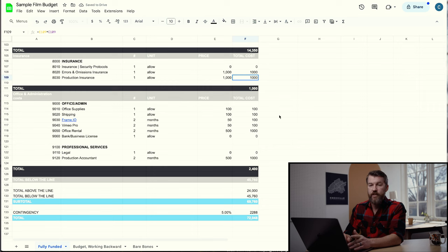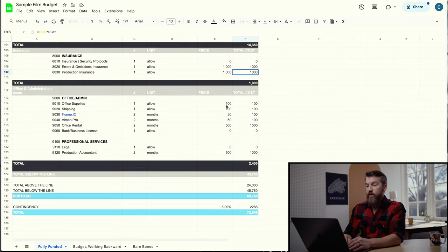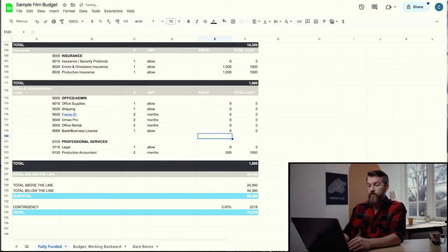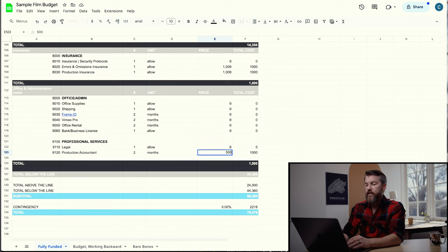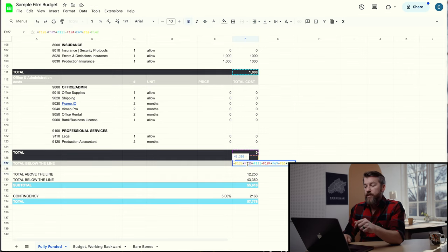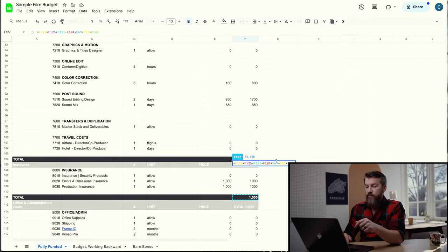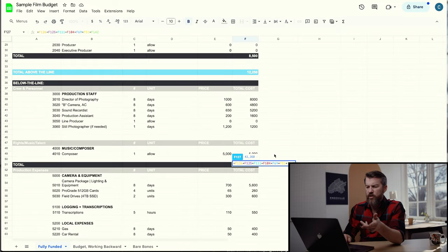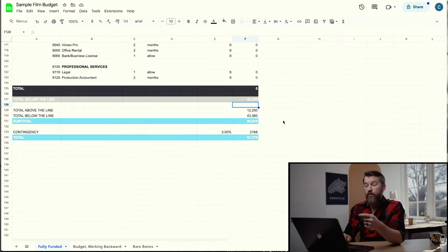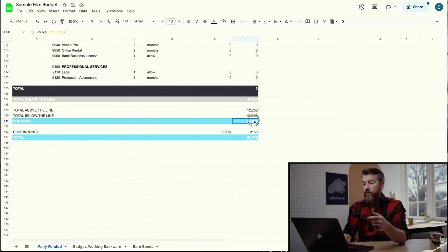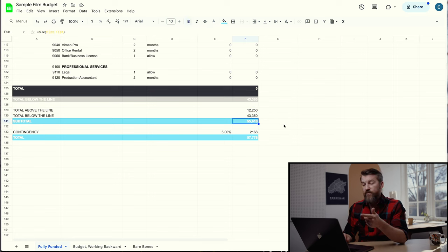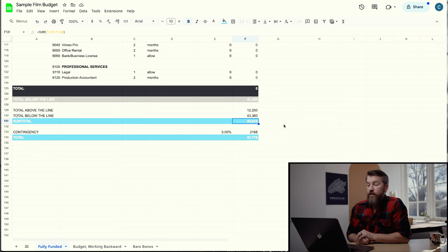For office and administrative things, for a budget this size we're probably not going to charge a lot back to the client, so we'll put that at zero. Entertainment lawyer and production accountant we'll also put at zero for this project. Our total below the line comes out to $43,360. Above the line was $12,250, giving us a subtotal of $55,610. That is our actual budget for this project.